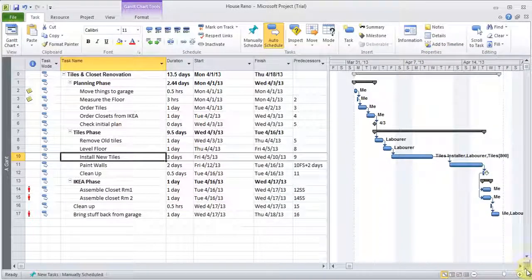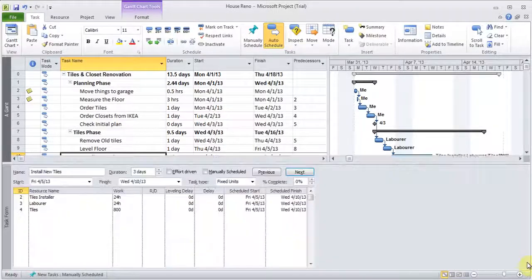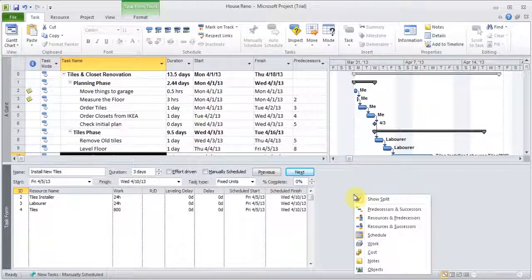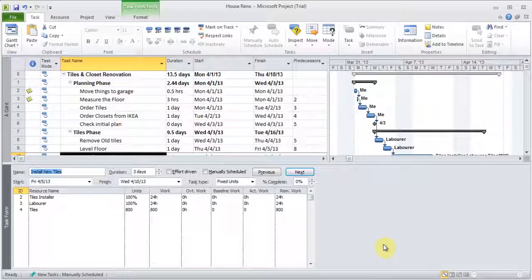Or you go to the corner here, and when you see that symbol in the right hand corner, double click and you should get this. Now if I right click on this part and add the section called work, in here I can add overtime if I wanted. That will affect that particular job and it will get done faster because now I'm allowing some overtime. So maybe for the tile installer, I'll add 4 hours.